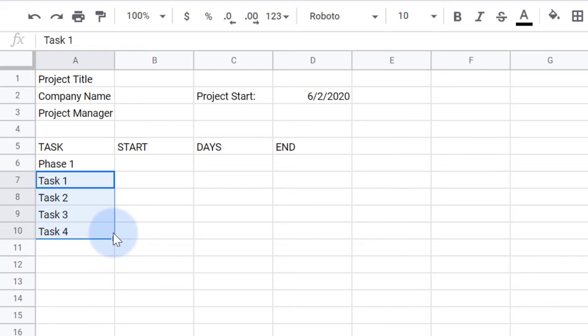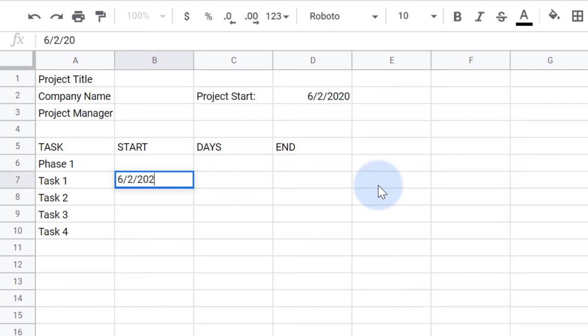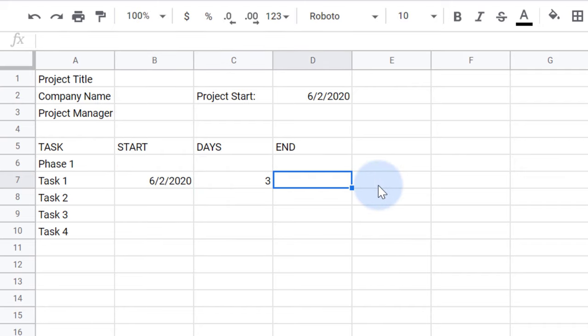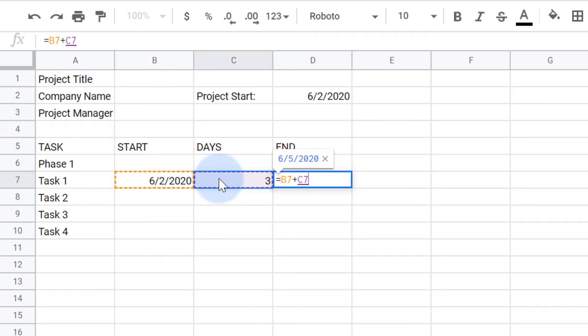Next, I'll add a start date and the number of days it will take to complete. I'll calculate the end date by taking the start date, adding the days, then subtracting one.